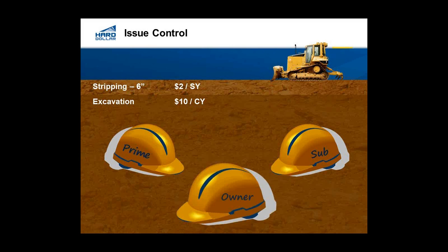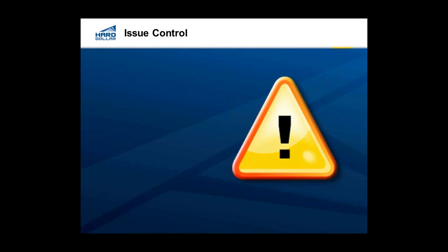And what it ended up being was the owner. The owner had actually measured this out differently, and instead of paying the lower amounts to the contractor for 6 inches, he paid it for 8 inches. So basically kind of undercutting the subcontractor. And so this ended up being a change that the owner realized thanks to the prime and got repaired, got resolved.